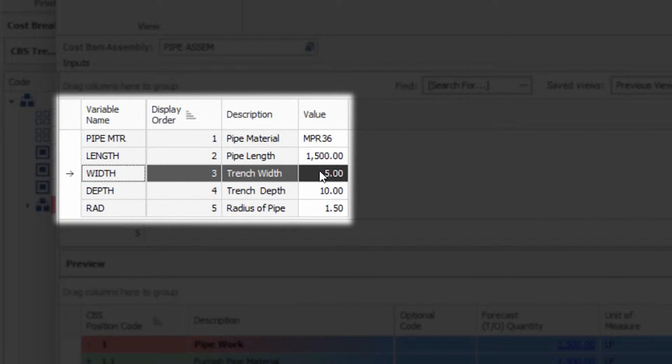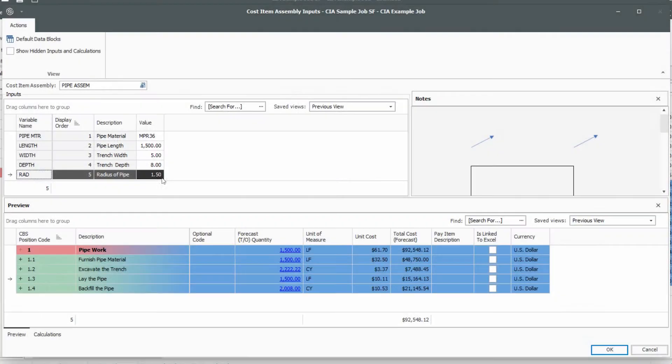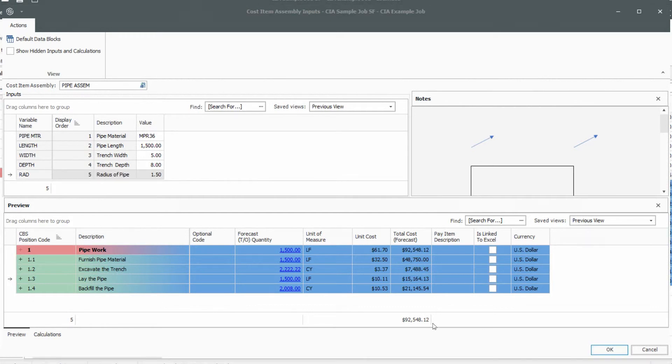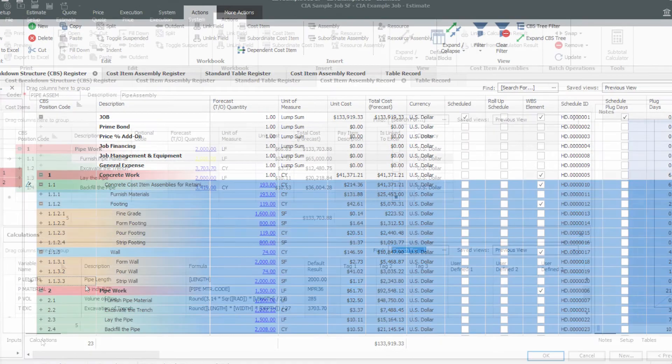our cost item assemblies are particularly useful for reducing the learning curve for new estimators. They help them start an estimate using a trusted cost model, then refining the estimate based on the specification and dimension-level variables that are unique to every project.